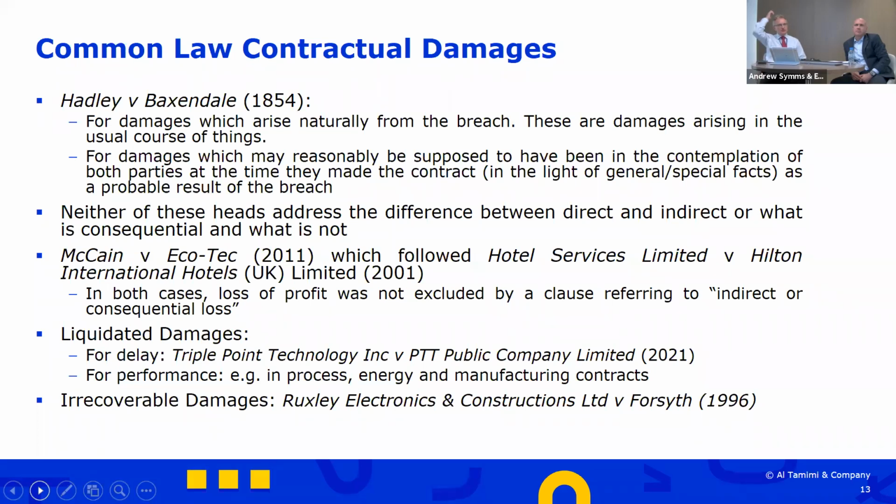Then liquidated damages, the case that I was referring to as being the somersault followed by a return to normal is this case called Triple Point, which is all in respect of liquidated damages as they accrue during the course of the contract. But then when there is a termination, and it links to some of the points that Ewan was making, what is the status then of the liquidated damages provision? And is there an entitlement to claim general damages? Obviously, we could go into great detail in respect of what liquidated damages are and how they're supposed to operate, but just take that as a key point in terms of English law related to liquidated damages.